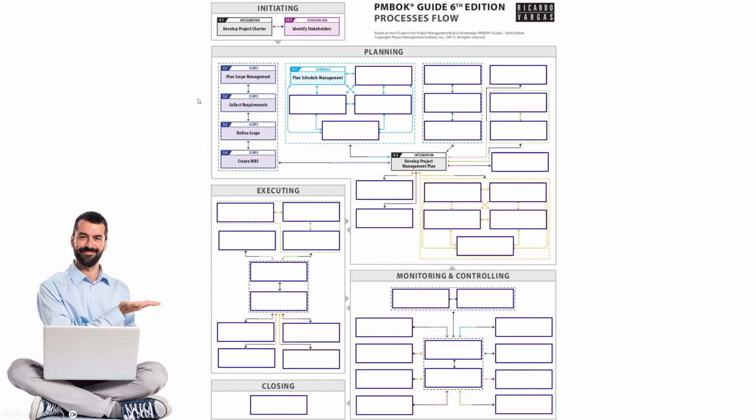So classically, this process 5.2, though it belongs to scope, has the purpose of collecting requirements, and it gets its instructions from the requirement management plan and not from the scope management plan, because we have two management plans in this area: the scope management plan and the requirement management plan. Once all the requirements have been collected and analyzed properly, that would actually define the product of the project, isn't it? When the requirements have been finalized, now we can clearly see what to produce, isn't it?